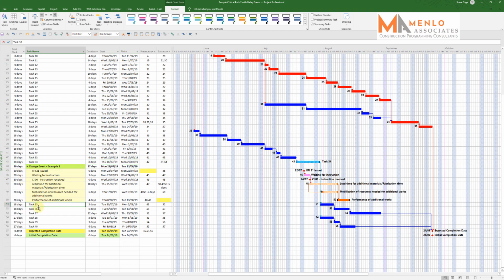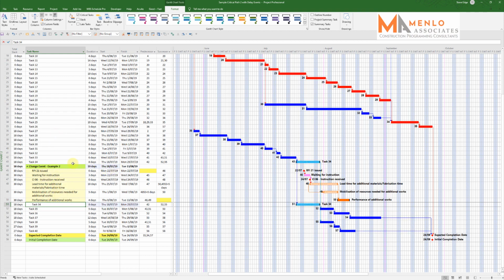Now I'm going to insert it at this point, and paste in exactly the same task in place. So now I've got 2 copies of the same task. You can see they're both 8 days, they're both highlighted. And the way I knit in the effect is, this task was 2 days in before this problem was found. So essentially the task is now going to be split into 2 parts.